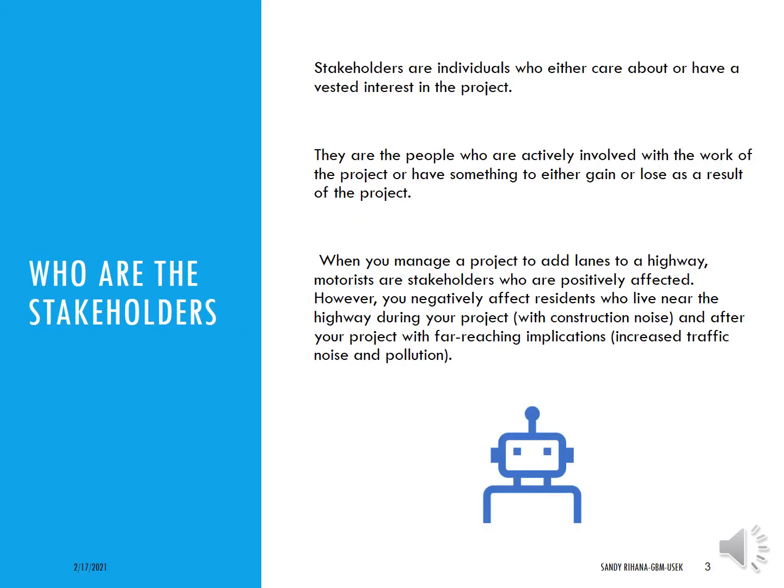Stakeholders are individuals who either care about or have a vested interest in the project. They are the people who are actively involved with the work of the project or have something to either gain or lose as a result of the project. When you manage a project to add a lane, for example, to a highway, motorists are stakeholders, and these stakeholders are positively affected, okay? Nevertheless, a resident who lives nearby the highway, during the project because of the construction noise and later on the traffic noise and the pollution, is also a stakeholder, but will be negatively affected by the project.